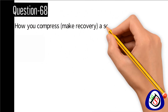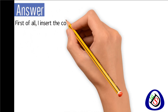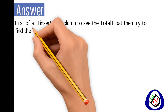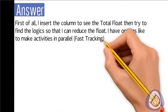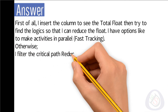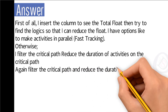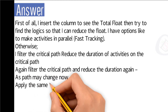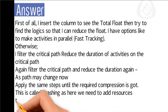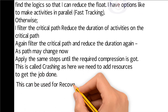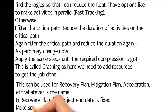Question number 68: How do you compress or make a recovery schedule in Primavera P6? Answer: First, I insert a column to see the total float and find the logic to reduce it. I can make activities parallel through fast tracking. I also filter the critical path, reduce durations of critical activities, then re-filter as the path may change, and repeat until the required compression is achieved. This is crashing — adding resources to get the job done. This can be used for a recovery plan, mitigation plan, or acceleration. In a recovery plan, the project end date is fixed. Always align your team before performing any procedure.